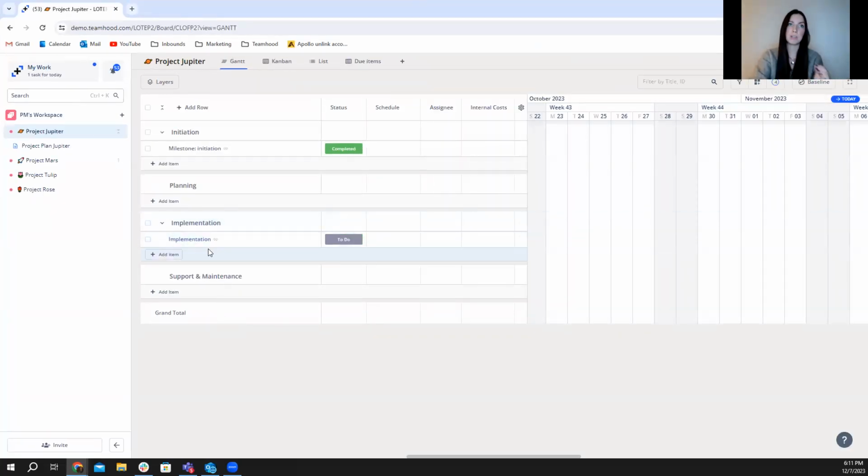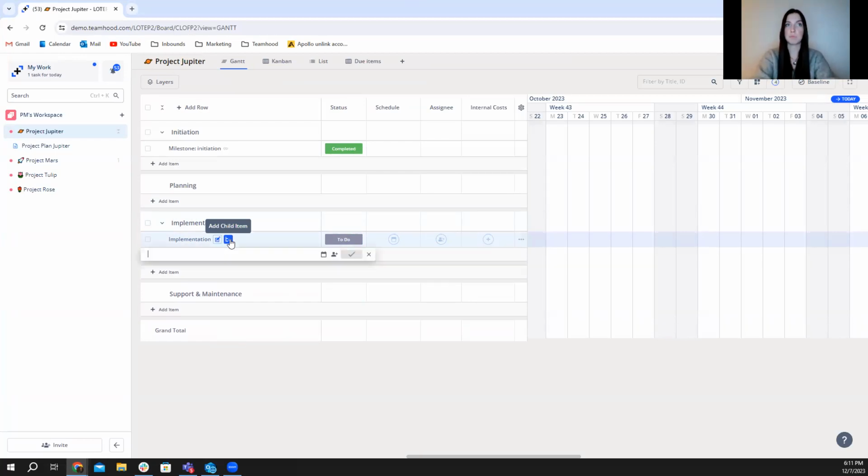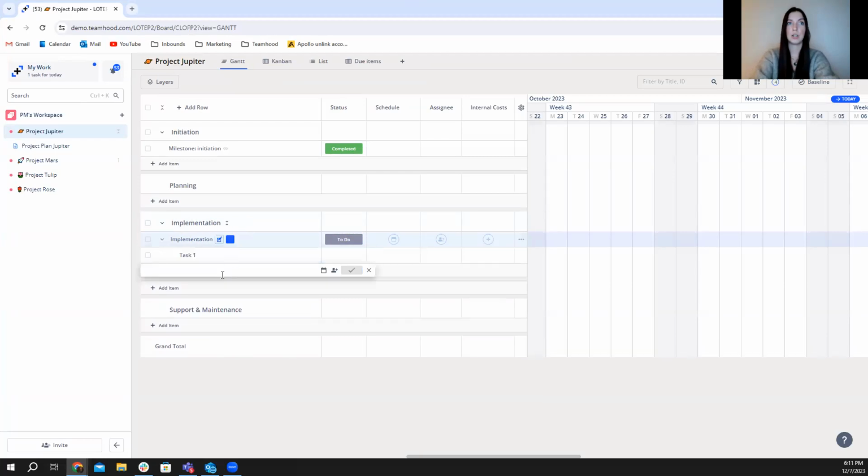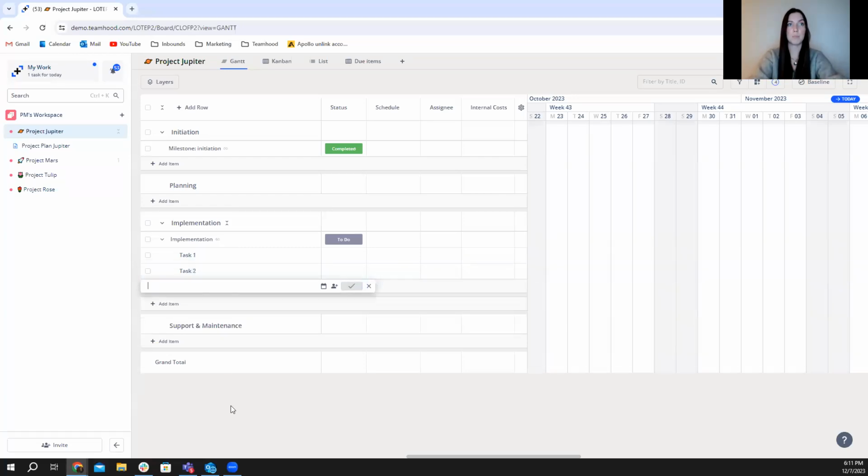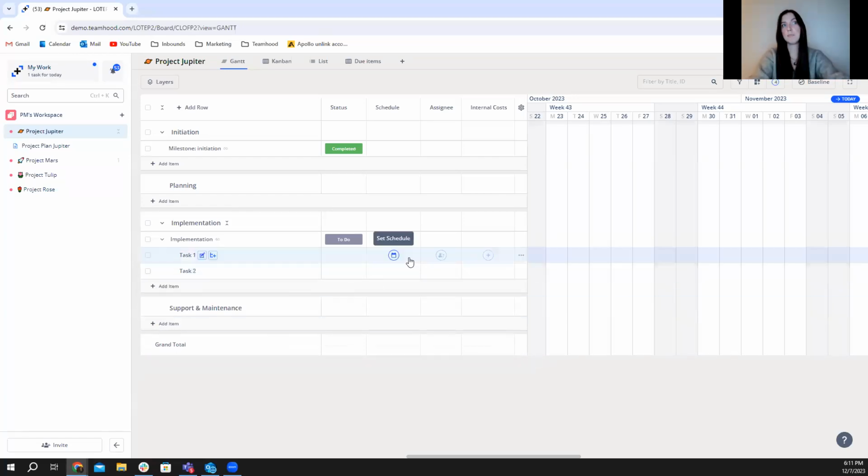So let's say that implementation task is quite a huge task, and it was taken down from the PMO overview board as kind of a summary of what the implementation is about. So the project manager, naturally, might want to differentiate it into other tasks. What you can do is simply create child items, do the synchronized copy, and then you might want